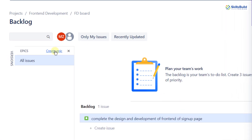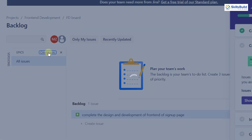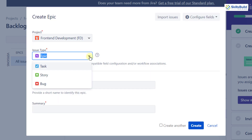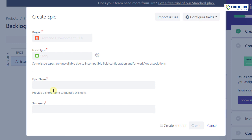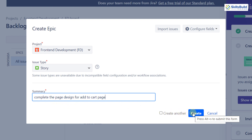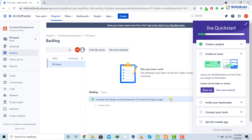I'll click the link again and create one more story. Again selecting story as the type, I'll enter the information: 'Complete the page design for add to cart page.' Then I'll click create. So we have successfully created two stories.